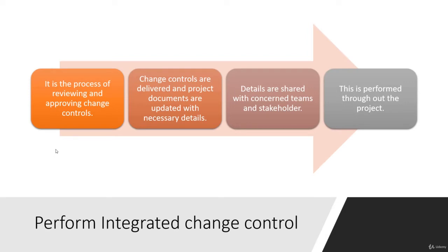This is called baselining. When you sign off, and sign off is not a one step process, you will have to walk through the entire document, all the requirements in it, with all the stakeholders. The sponsors will approve it, and after getting that, you baseline it. Now, if any change is proposed in this document, let's say you get a new requirement, that will go through the change control process.